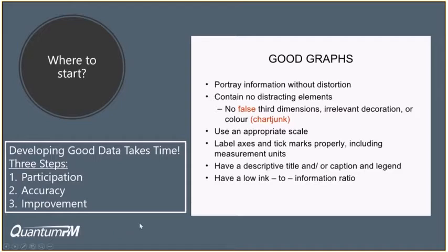So again, going back to this, where do you start? Okay, we can create some great graphs, have things looking really good, but you have to recognize that creating good data really does take a lot of time to accomplish. For organizations that are at a lower level of maturity, they will have people who are reluctant to put their projects into the system. So they're dragging their feet that way. You can have a great report, but if there's no data coming in, it's an empty report and doesn't do you much good.